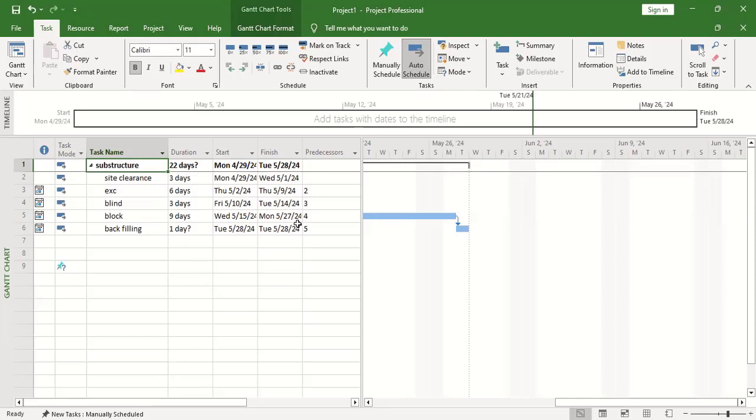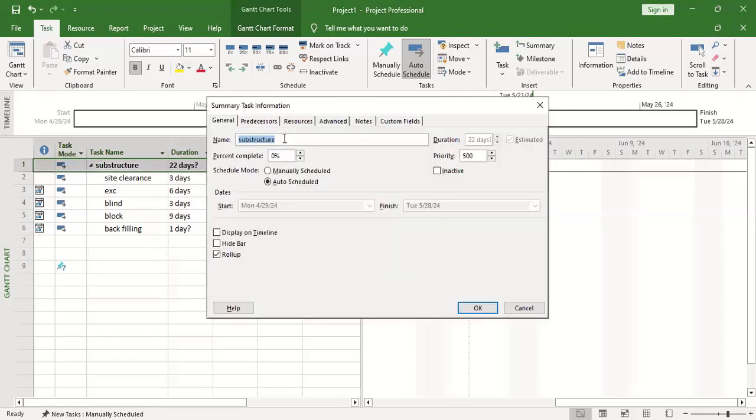So at that point, if other project managers are handling it and giving you those things, as a project analyst or project manager expert that you are, you can copy their project schedules and summarize them, put them under summary tags so that you can hide them. For example, what I'm going to have here is project in Kaduna instead of this substructure, right? I'll just have only project in Kaduna.